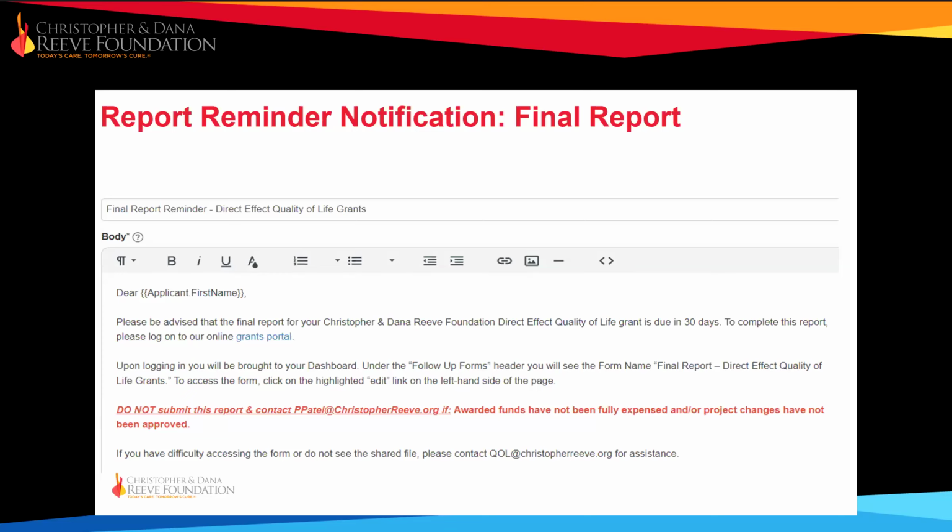These requirements are important because we track and report on funded activities line by line. Our reporting compares your proposed budget and activities with the actual outcomes. We cannot close a project if there is an outstanding balance. So please wait to submit your report until all of these conditions have been resolved.